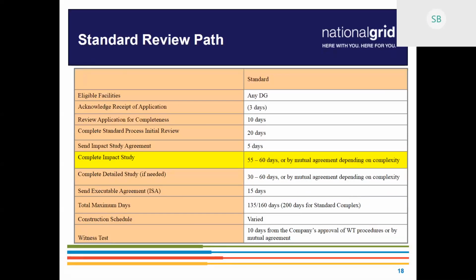We're pulling that up much earlier in the process. Depending on when we can finalize locations, points of interconnection, those types of things, we need those to submit the generator notification forms to the ISO. Once we have that information, we're going to provide it as early in the process as possible.